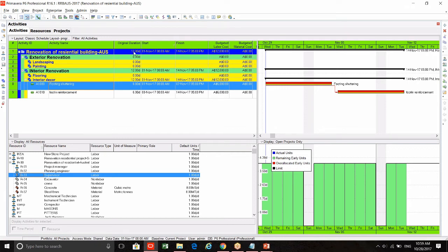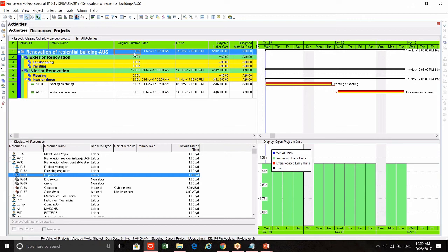So nowadays, an 8 day project has become a 12-day project. If you work in a big project, say 360 days, 1000 days, and if you automatically level, all the overallocated activities will move on, and this will end up with a huge project duration. So this is the reason why we won't use the automatic leveling option.